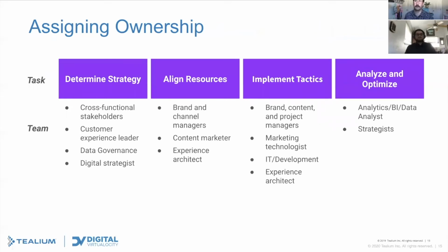Now, a critical step, and Dustin elaborated on some of this, is that as you develop your CDP plan, you're going to need to determine who the key stakeholders are, but ultimately also assign roles and responsibilities to everyone who's going to partake in this journey. These roles are understood to evolve. It may not involve everybody at the same time, but by outlining the steps, adding them to milestones and timelines, people have a lot of clarity around when they're going to be needed and when they're required to complete the task so that you can get to the next step along the journey.